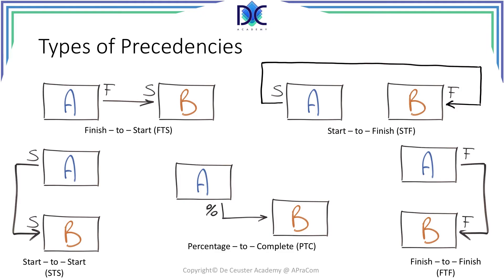There are four types of precedences which have been defined in the Project Management Body of Knowledge: a finish-to-start relationship, a start-to-start, start-to-finish, and finish-to-finish. Let's start with the finish-to-start relationship. It means that task B can only start when the predecessor A is finished. When there are more predecessors, B can only start when all predecessors have been finished. The finish-to-start relationship is one of the most common relationships between activities, and it is also the one used in this class, because it's the easiest one to work with.